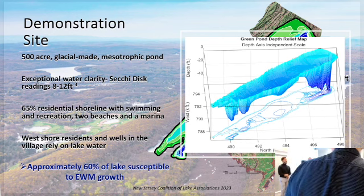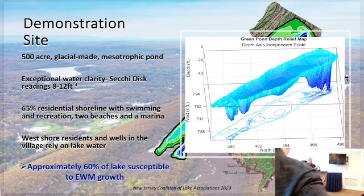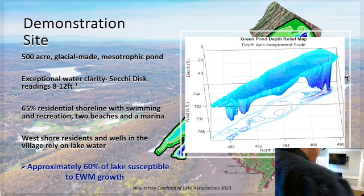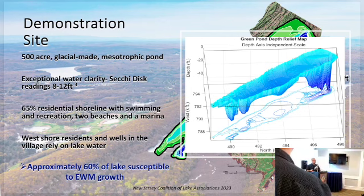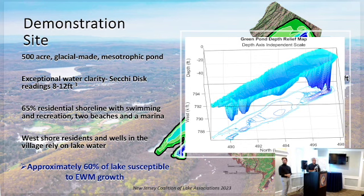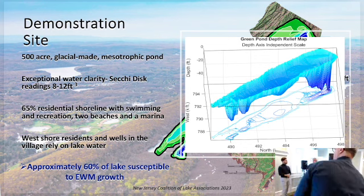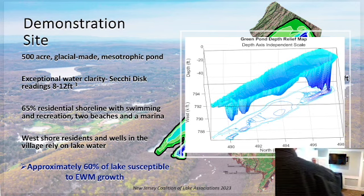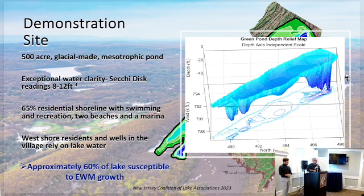Does this require a permit because you're disturbing lake bottom? It does not, because we're not dredging. So in other words, you're allowed to pull something, even though you're pulling something out? Exactly, because you're not specifically removing any substrate or sediment. It just kind of comes along with the roots. Dredging would be if we put that device on or near the bottom. Okay, so we thought anything that disturbed the lake bottom needed a permit. From our understanding, we don't need a permit for this just because we're keeping the hose ends elevated off the bottom. Exactly.